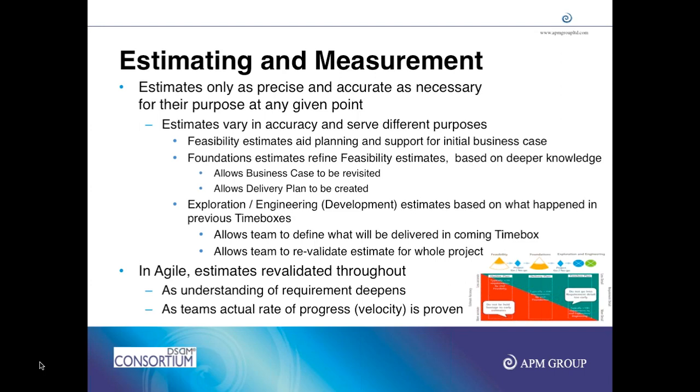And in the first day, based on my experience, I can tell you if it is 2 days, 3 days, 5 days, whatever. Similarly, when you start a project, you can say, assume we have 20 story points each time box, and if you use a 2 weeks time box, how long is it going to take to complete the project? Because it is inspect and adapt, when you finish the first time box, you count how many story points were delivered. And then you look at it, well, okay, we delivered 40 and you assumed 20. Let's do another time box.